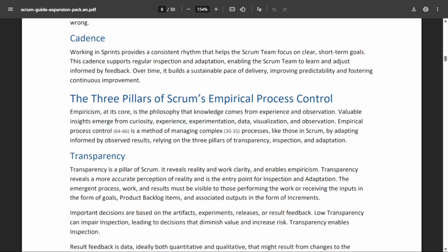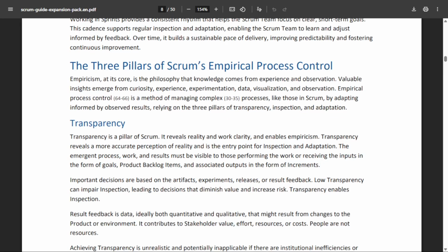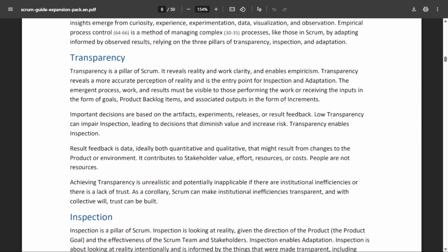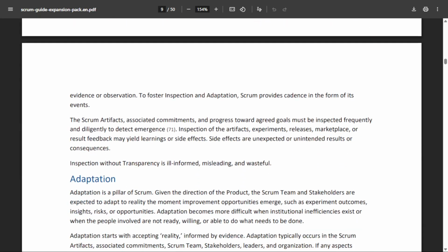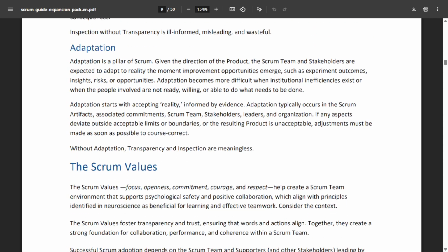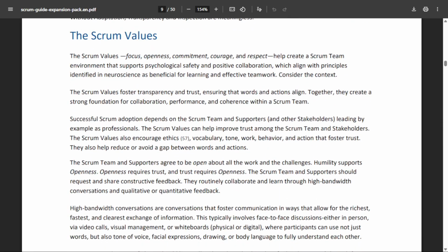We have sprints, we have sprint reviews, we have sprint retrospectives, and that creates predictability and reduces chaos. Then we get into the concept of the 3 pillars, a TIA factor, I call it: transparency, inspection, and adaptation. When we talk about transparency, we mean everyone sees the same facts. When we talk about inspection, we're talking about frequent checkups on progress and product. And when we talk about adaptation, we mean we adjust our course quickly as reality changes.